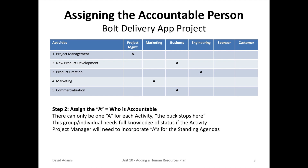The first letter assigned in the RACI chart is the letter A — who is accountable? You can only have one A per line. The accountable resource is defined as 'the buck stops here.' That's the one group or individual that needs to have full knowledge of the status of the activity. That person may or may not be involved in the actual work, but they are the all-knowing for that particular activity.